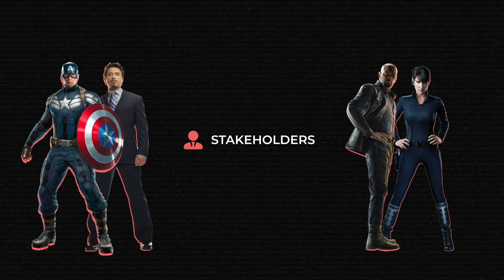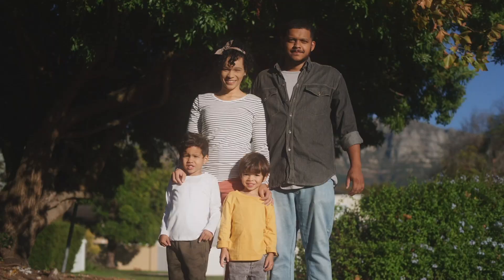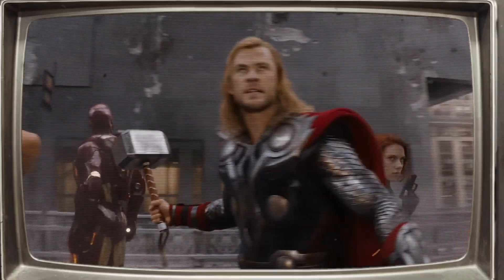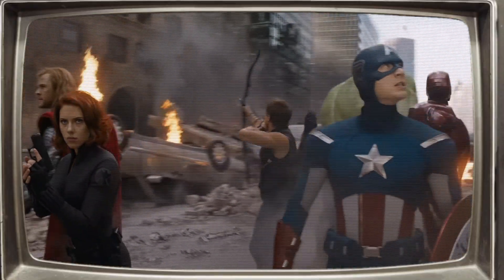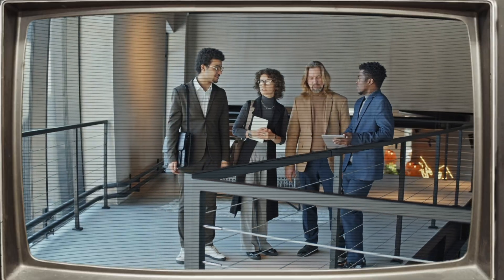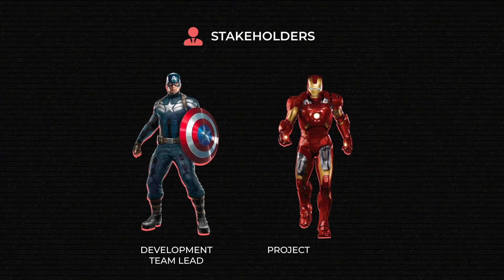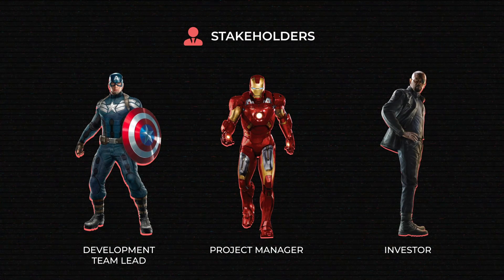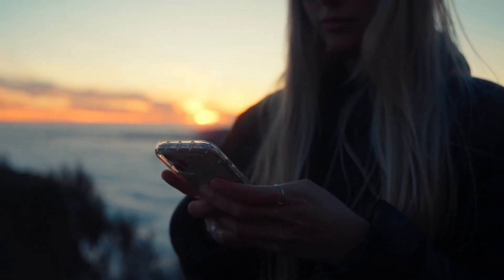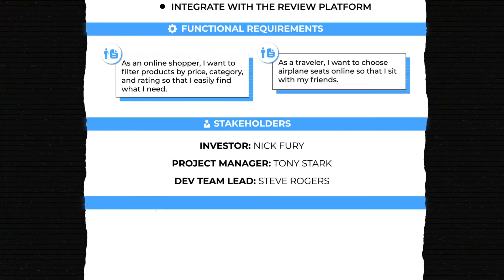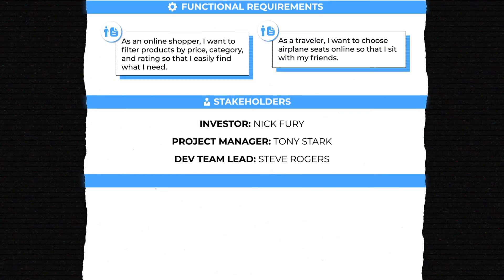Stakeholders are basically anyone who's affected by or can affect the project. For your house construction project, stakeholders will be your family members, the architect, the builders, your future neighbors, the local governing body that must give approval, and so on. In software projects, there are also many stakeholder groups with diverse interests. Some are actively involved, like development team members and the project manager. Others are less engaged — C-level managers or investors might not deal with the project daily but still have a big impact. End users are another stakeholder group with their own interest in the end product. As you list stakeholders in your BRD, specify their role in the project so everyone understands who is responsible for what.